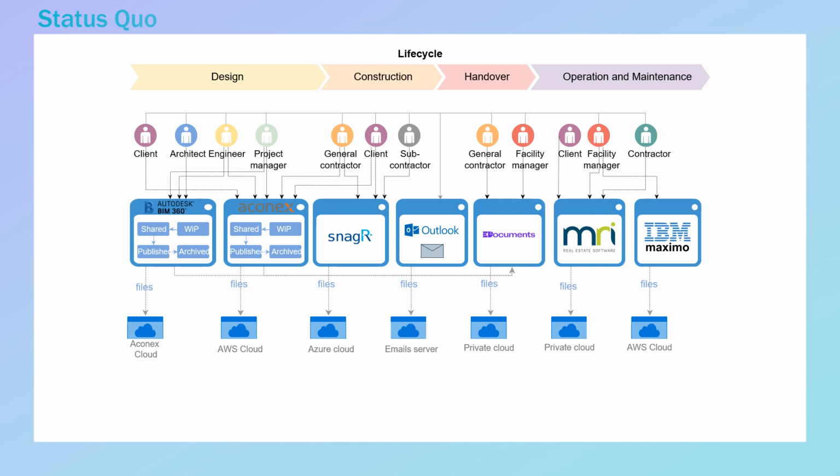During the construction phase, it's similar, so similar tools are used or additional ones like Slack. Apart from that, emails are also in common use. And during the later stages, the handover data is collected through tools like Springboard to transfer the data to FM systems and CMMS systems used in the operation and maintenance phase. Using multiple tools that are not integrated with each other leads to massive problems with data integrity, lack of traceability, and transparency of construction projects.